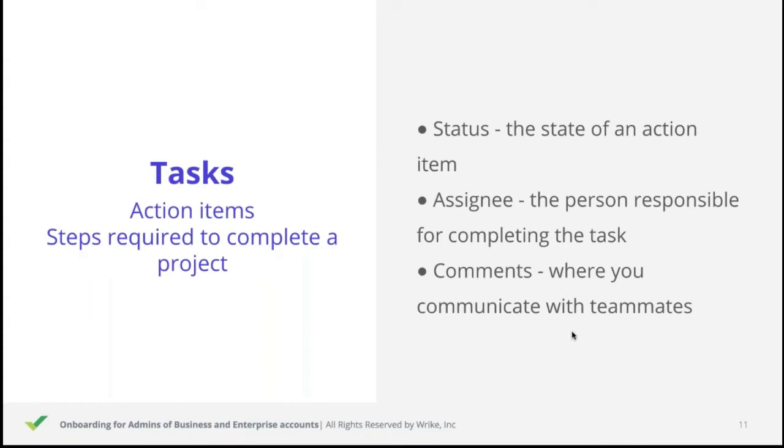As I said, each task has a lot of different attributes, but I would like to highlight 3 of them from the very beginning. And these attributes are task status, assignee, and time frame. When the task is assigned, every member of your team has a clear understanding who is responsible for this particular part of the work. When the task is properly scheduled and the start and due dates are correctly set up, it is very easy for your team to prioritize the work on a daily basis. And finally, task status represents the stage this particular part of work is currently in.